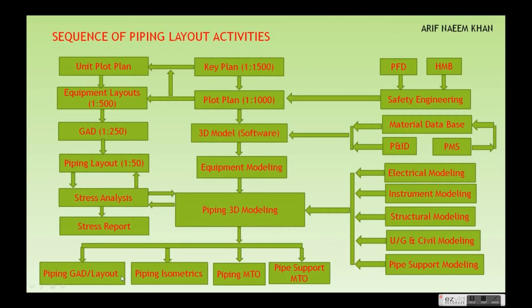While in 2D you can start quickly, at the end of the day you take a lot of time to extract all this information from 2D, like for preparation of piping GADs, piping layouts, piping isometrics, and manual MTO and manual pipe supports MTO. It takes a lot of time and effort to get all these construction drawings and procurement quantities.